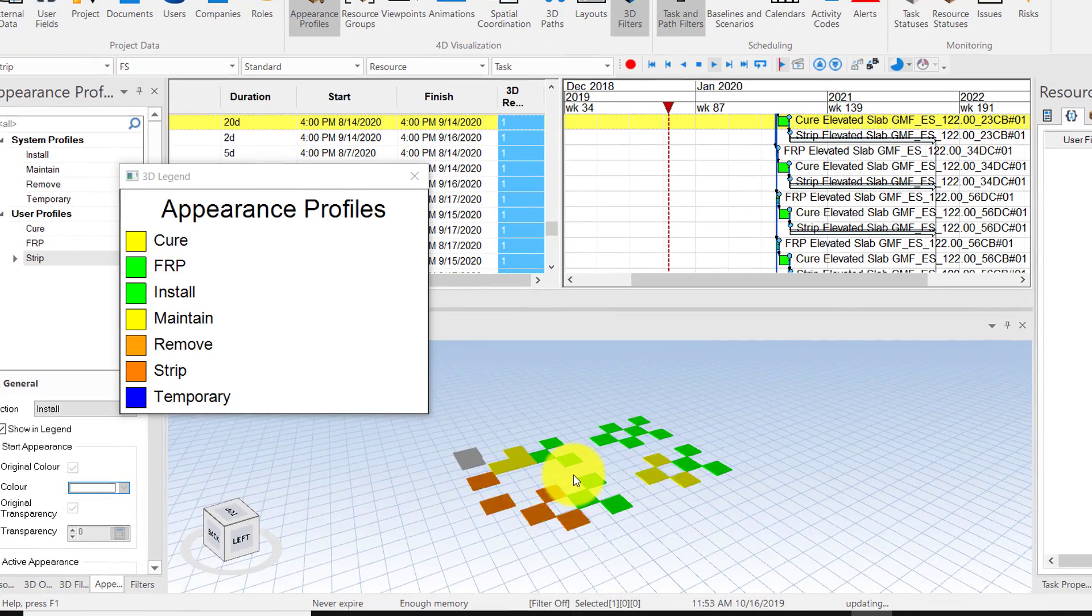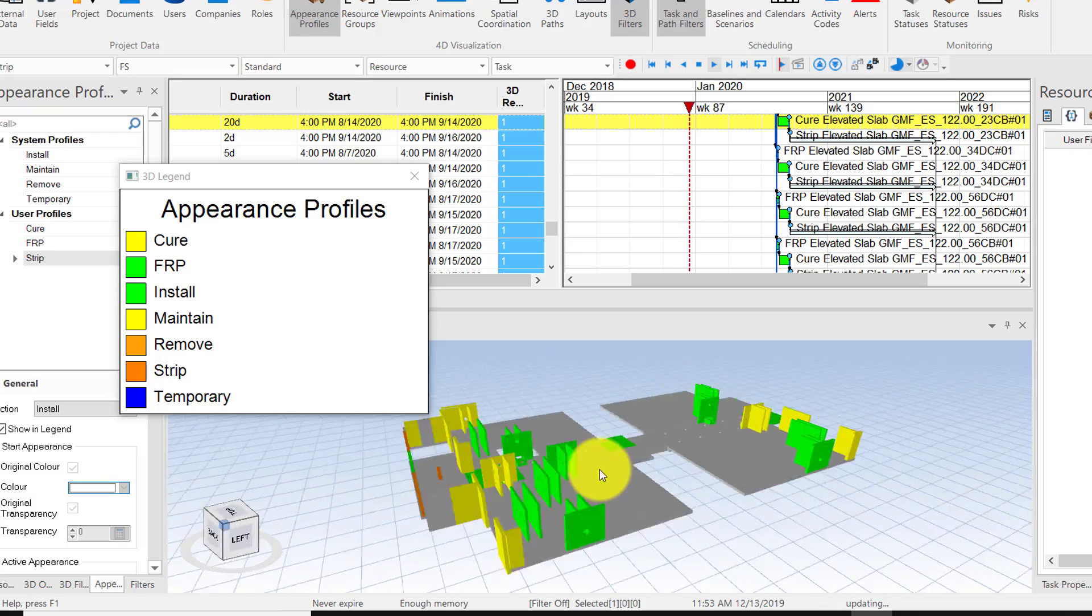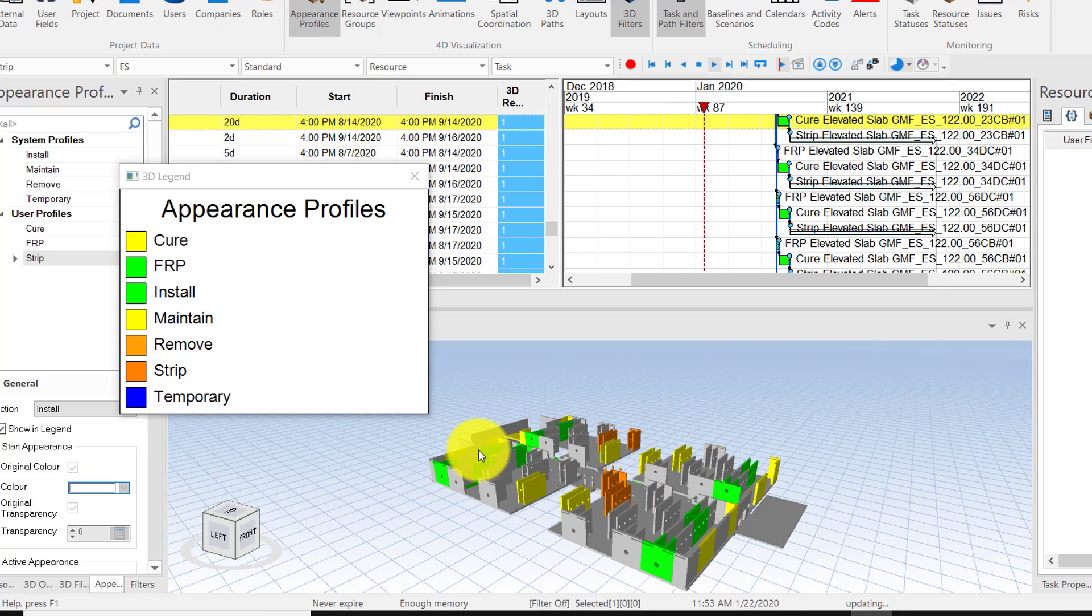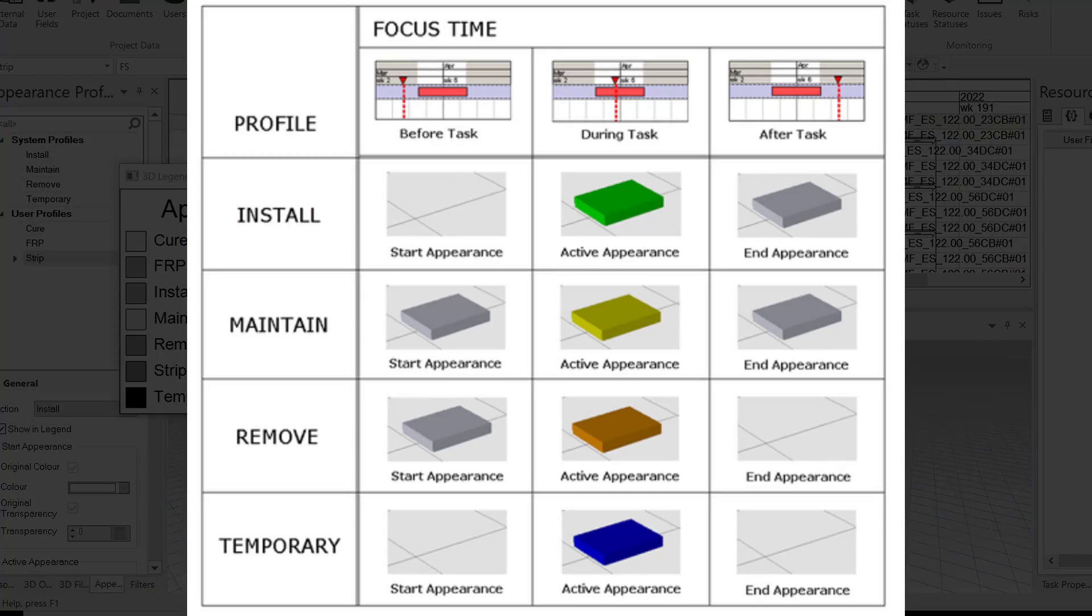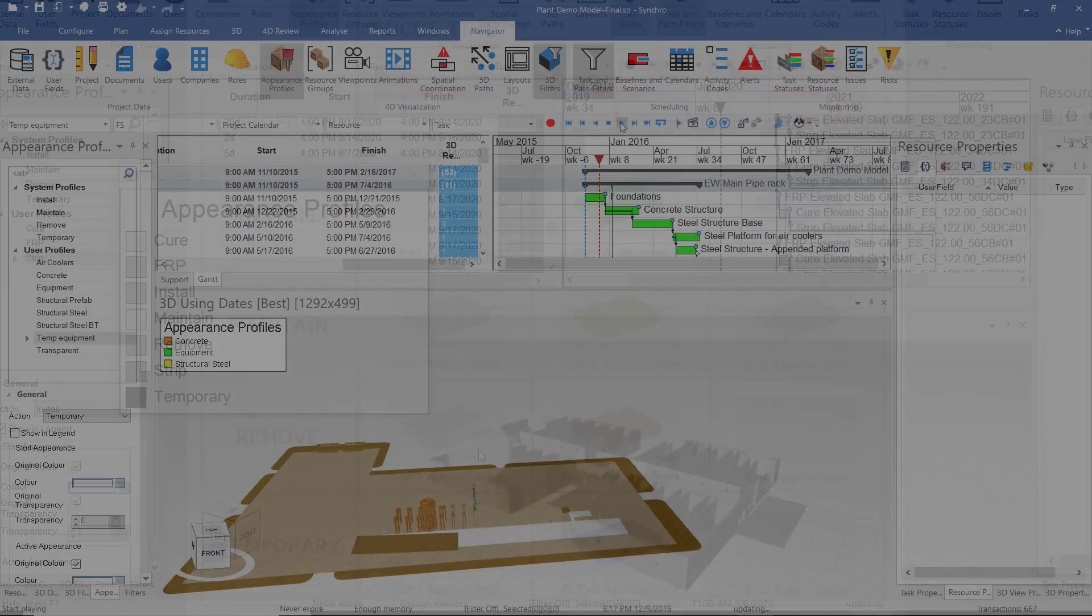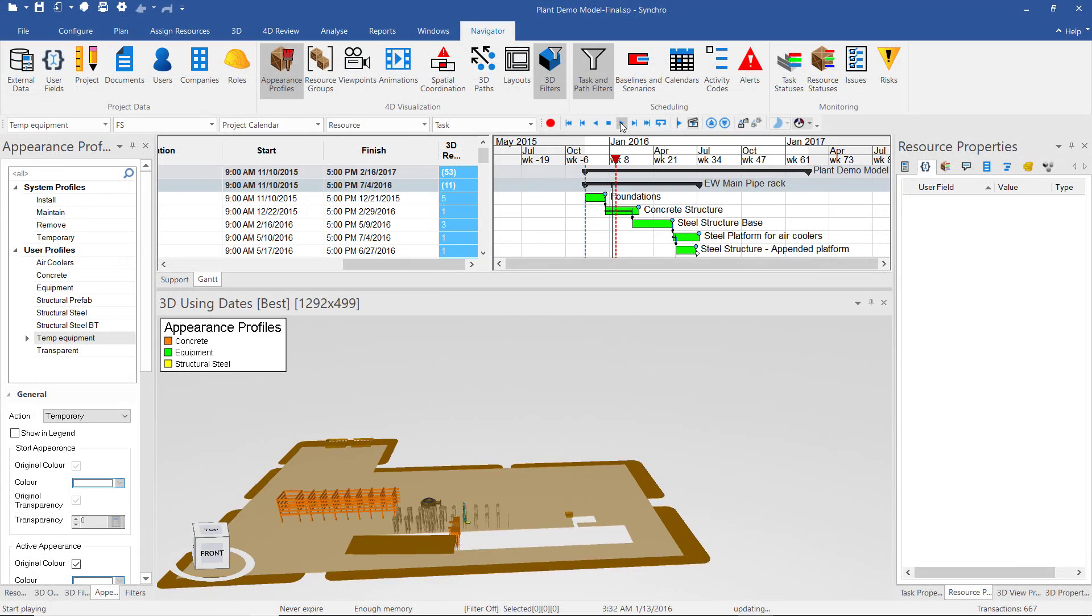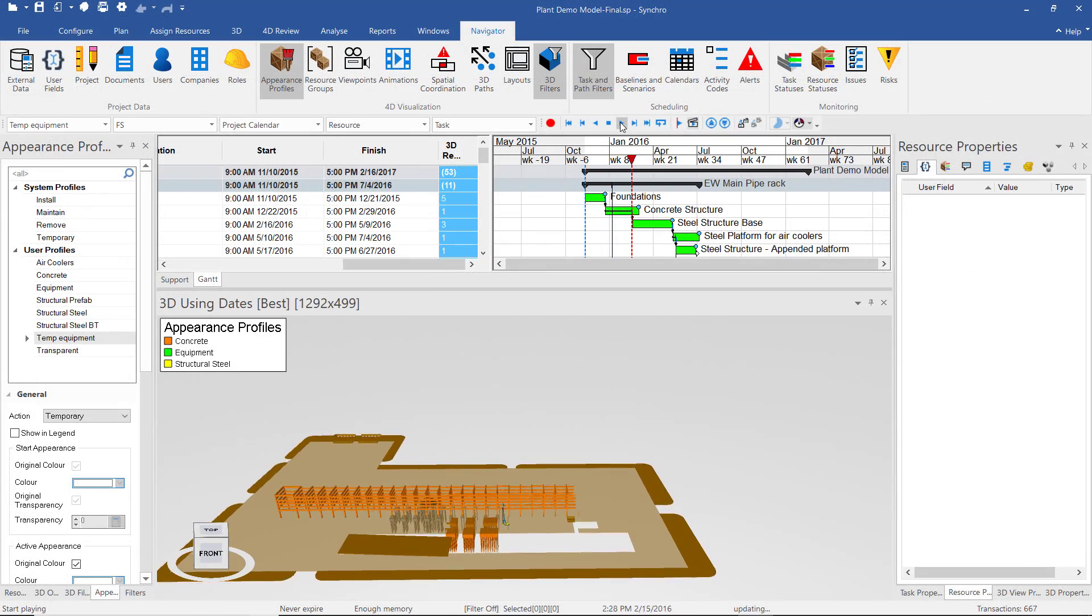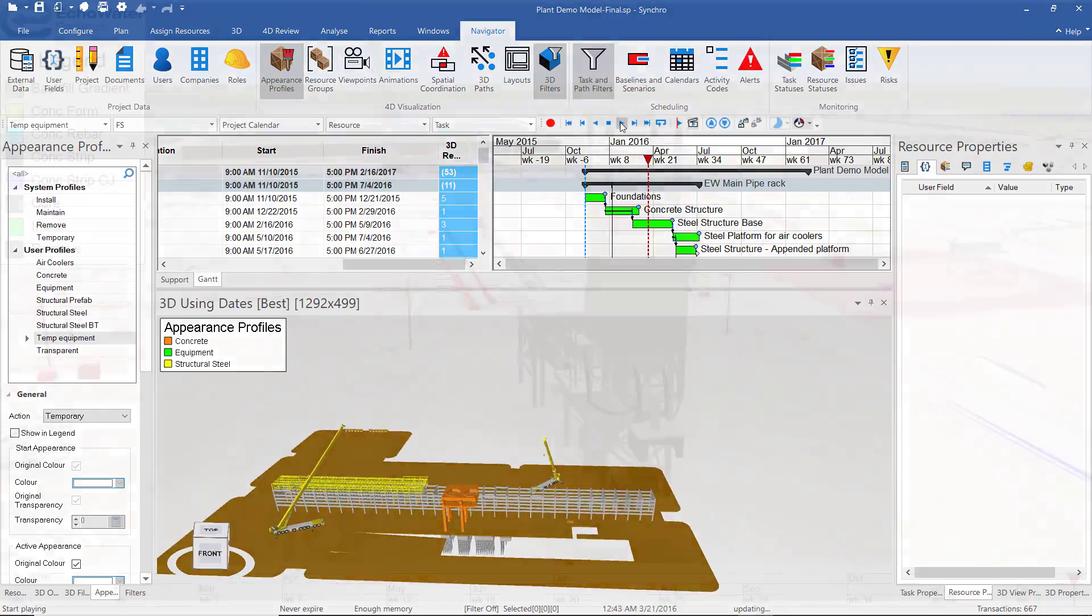Finally, you'll use appearance profiles to define the type of action happening between each resource-to-activity link. For example, whether it's installed, maintained, removed, or temporarily worked on during that activity. And then while that's happening, what will the colors and transparency levels and direction of work be?